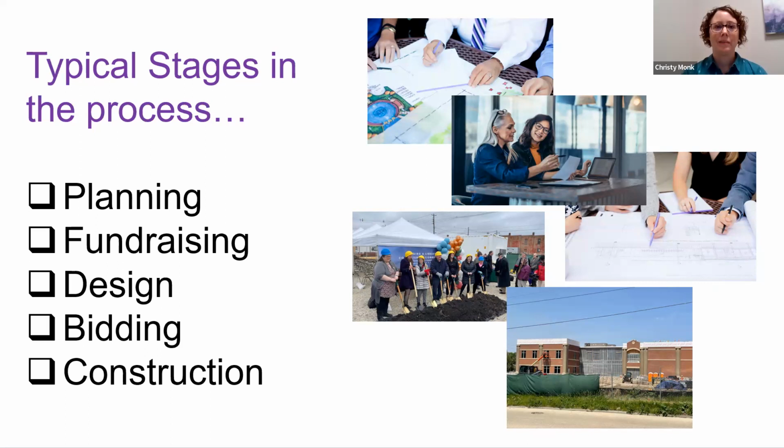And once you have your design secured, your funding is in place, and your approvals, you will then really start to develop the detailed drawings that go into a project. There's many phases to that, which we will cover in a high level of detail. And then you go through the actual public bidding of your projects to contractors that will actually want to do the work. And the bidding is not only for the construction of the building, but it's also for all of the contents of the building. So that would include your furniture and your furnishings and your audiovisual equipment. All of those video things really need to be part of the overall project.